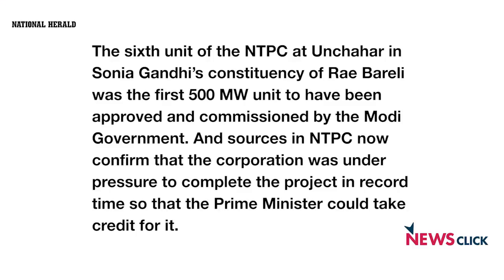It is said that the accident took place because various safety measures were being bypassed because NTPC was in a hurry to complete the full commissioning of the plant which had not yet been done so that the Prime Minister could inaugurate this unit number 6 of the Unchahar plant. In the midst of this it is argued that various safety precautions were not taken and various safety measures bypassed.